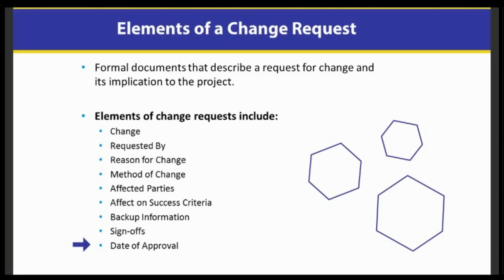So this is why I always train my project team to say, hey, that's a great idea. I would love to make that change, but you need to go through the formal change request process before I can do that. And then I'll be happy to do that for you. By getting people to say that, we're not saying no, and we're not saying yes, we're saying we need more information, and we need to make sure that we have approval to make those changes so that if it takes longer or it costs more, we're not going to get in trouble for that.